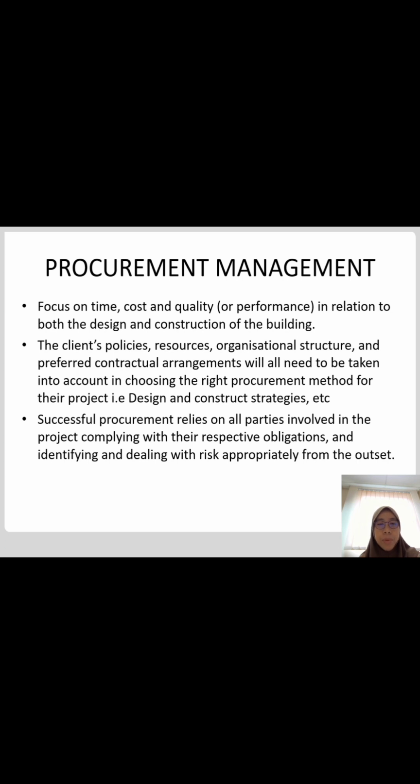The client's policies, resources, organizational structure, and preferred contractual agreement all need to be taken into account in choosing the right procurement method for their project, for example design and construct strategies and so on. Successful procurement relies on all parties involved in the project complying with their respective obligations and identifying and dealing with risk appropriately from the outset.